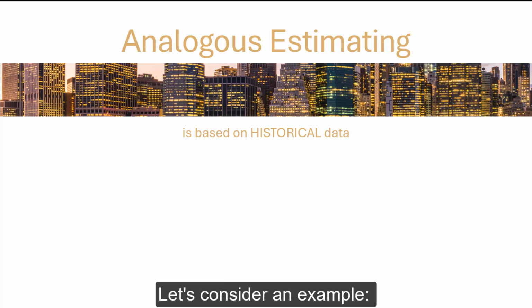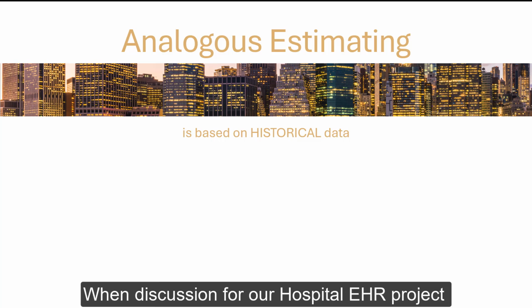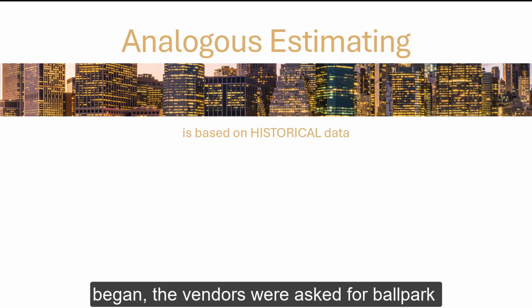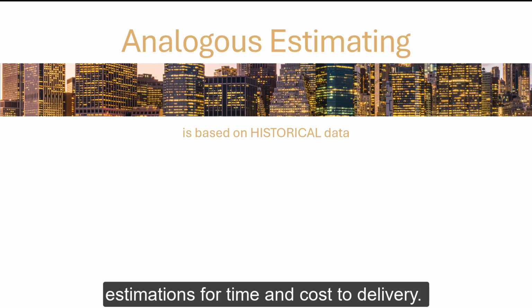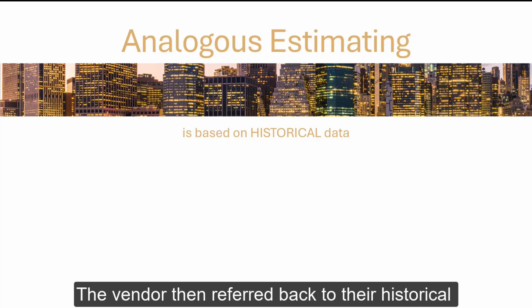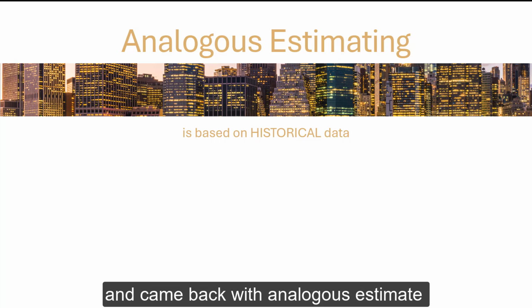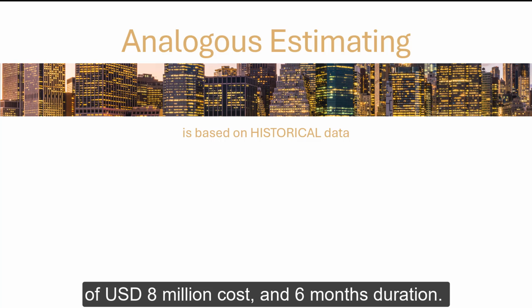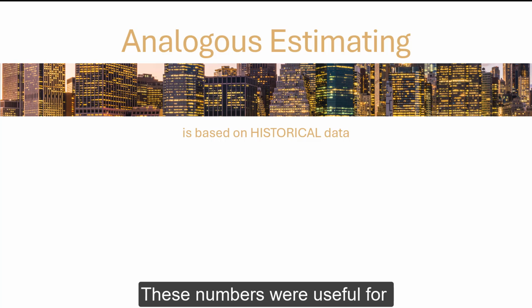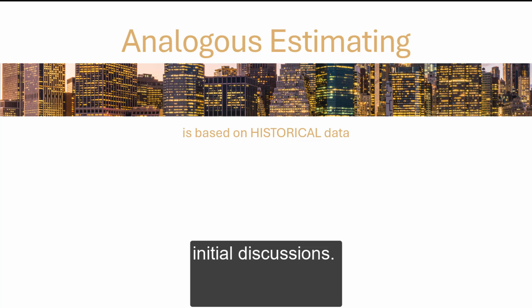Let's consider an example. When discussion for our hospital EHR project began, the vendors were asked for ballpark estimations for time and cost to delivery. The vendor then referred back to their historical data of past implementations of a similar size and came back with an analogous estimate of USD 8 million cost and 6 months duration. These numbers were very useful for the initial discussions.